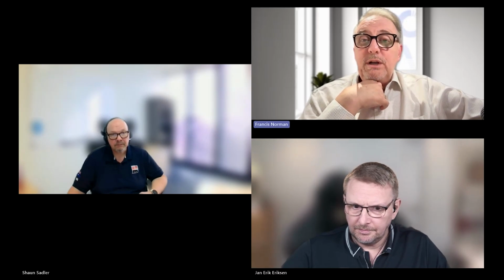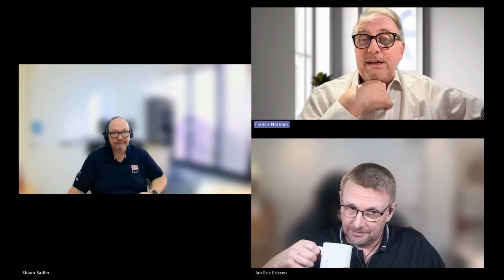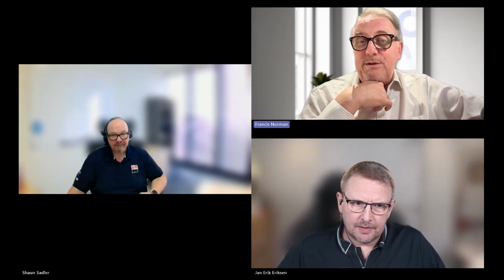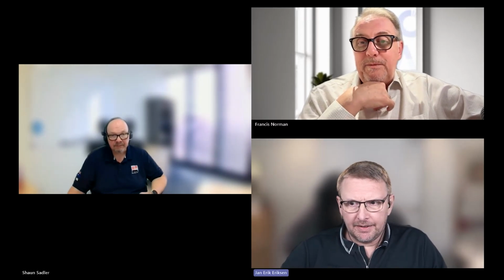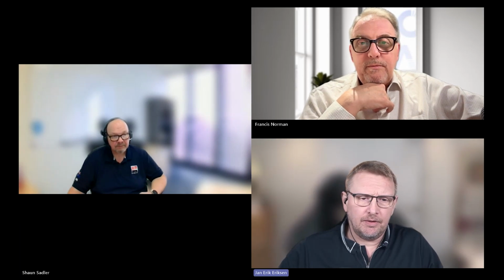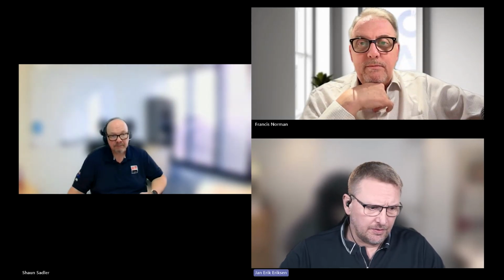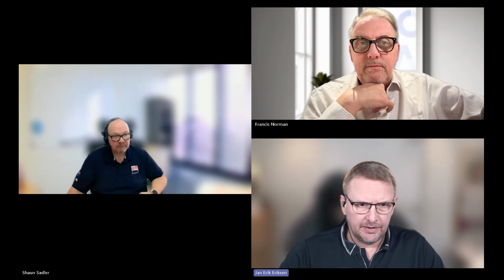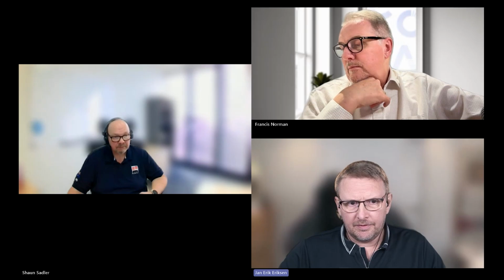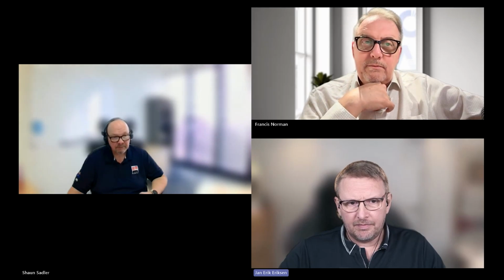Which comes back around to early engagement, of course. Start talking to you guys early in the piece so those systems still exist when you get out there to do that work. Yeah, I think that's very important. The earlier we get in Norway, we very often get very early in, because it's quite normal in Norway to have studies. We participate in a lot of decommissioning studies. We sit down with other third parties, other suppliers, and we have a certain task from the asset owner to go through, and we will give them input maybe 2-3 years before actual COP.